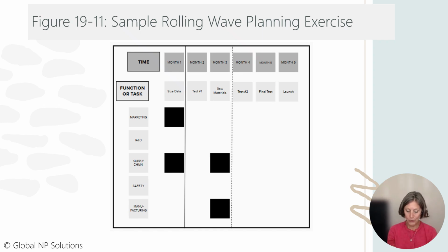Planning poker was first described in Chapter 9. Estimates resulting from planning poker are relative to other project tasks and historical data. So instead of developing a very detailed upfront schedule, planning poker yields information at an actionable level for a lean product development project at this stage.